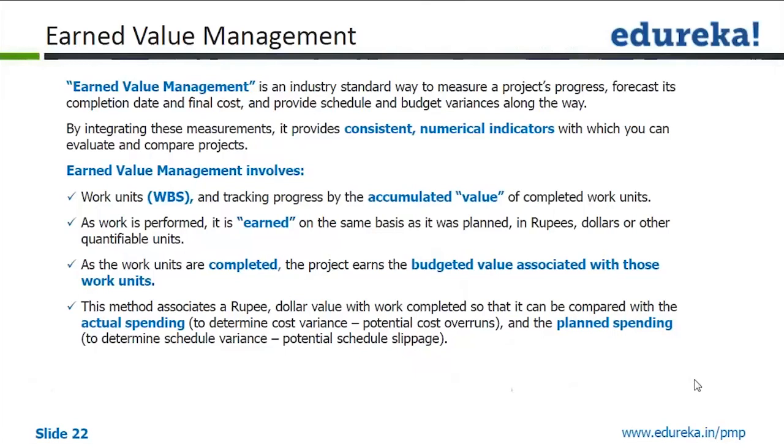So we will look at earned value management. Now earned value is an industry standard way to measure a project's success or progress, forecasts its completion date and final cost, and provides schedule and budget variance along the way.